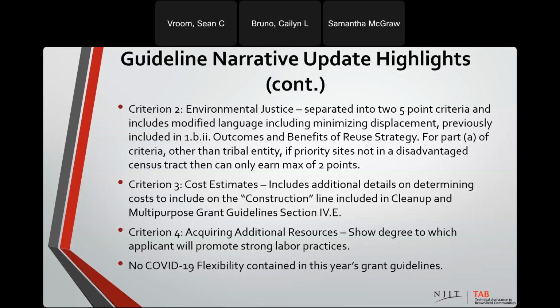points. Under criterion 3, cost estimates, it includes additional details in determining costs to include the construction line included in the cleanup and multipurpose grant guidelines. Just to make this a little bit more understandable, what they did was, because in a multipurpose grant and maybe in a cleanup grant, you may not be completely sure of what the construction costs related to remediation are going to be. So you would include them in a separate line item in your budget table.